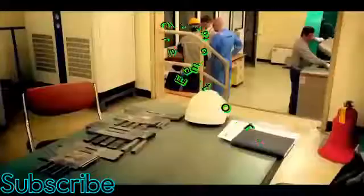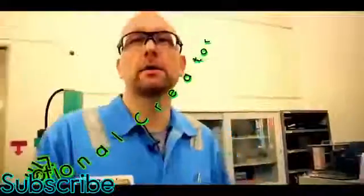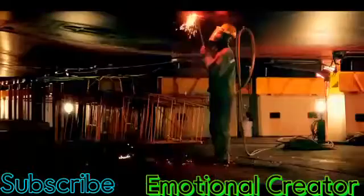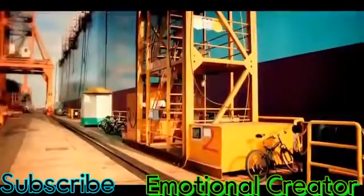The test weld passes, convincing Peter the real welds will hold out. Done as expected. Yeah. With the help of the robots, the yard gradually claws back the lost time, welding a further 7 blocks together over the next 27 days, bringing the build back on schedule.